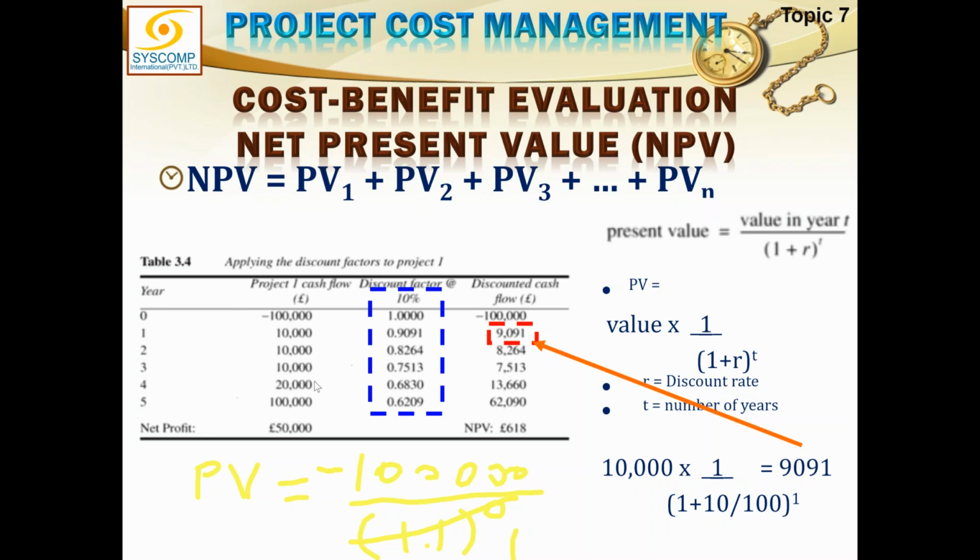Okay, got you. But the 10,000 rupees, which is coming after 1 year, in this case the raised to the power time value will be one. That means I have to divide 10,000 rupees. This is plus 10,000 rupees. Here we have got 1. So 1.1 raised to the power of 1 is 1.1. 10,000 divided by 1.1 is equal to 0.9091. So 10,000 multiplied by 0.9091 is 9,091 rupees. So this is for the first year.